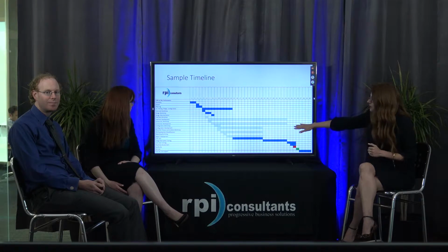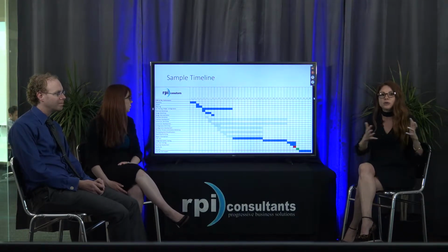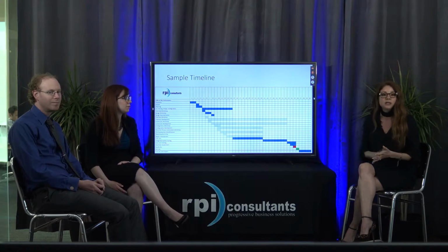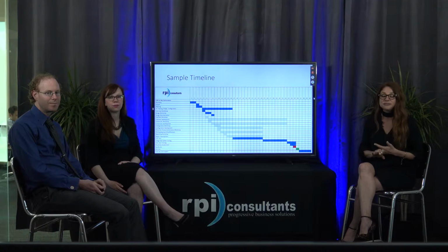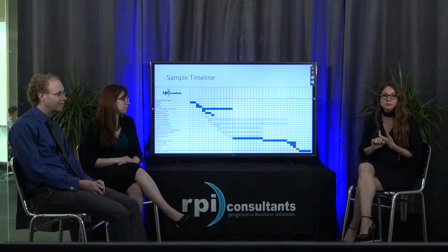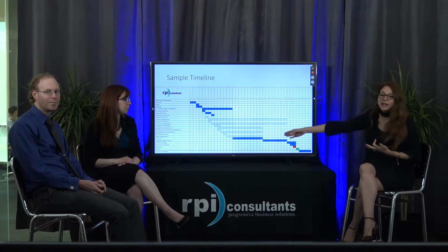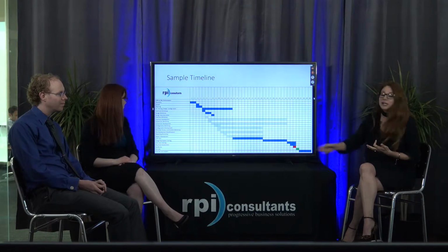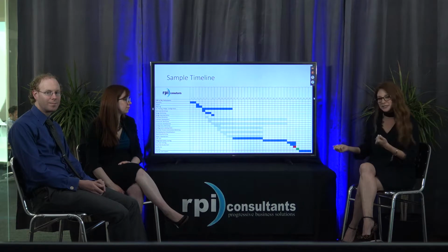The lighter blue lines here is development that's going to be happening concurrently with your IT or your partner, our IT team: your interface development, reporting development, your conversions. I can't stress this enough, it's very important to get started building out your conversion files day one, as soon as possible. We've got it happening right when design starts, because you do want to start getting that data into your system for testing.